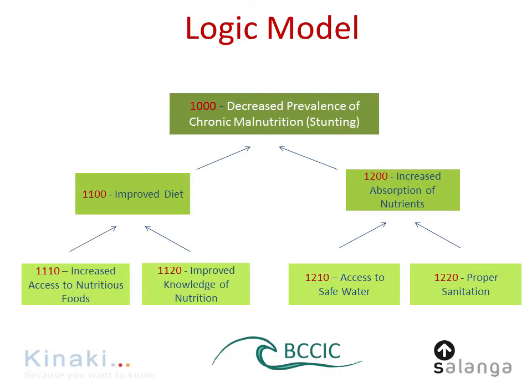When we look at the logic model, basically we take the problem tree, if we have spent the time and done it, and we try to flip potentially all the steps or all the levels into a positive statement. Basically, statements which are completed, which show us what the achievements of the project should be, where we want to be at the end of the project.